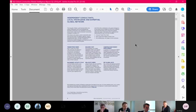They then take that data, consolidate it by use class, by region, by specification, and then they play that back through this report. It is empirical. This has come from the market. As I said, AECOM do a very similar thing, and I would say a very, very high percentage of property industry professionals look at this sort of data at this stage of design, where there's limited design. So a lot of people say, for want of a better word, these are the Bibles of construction costs.